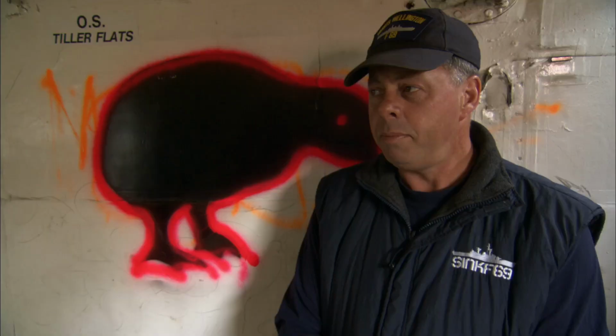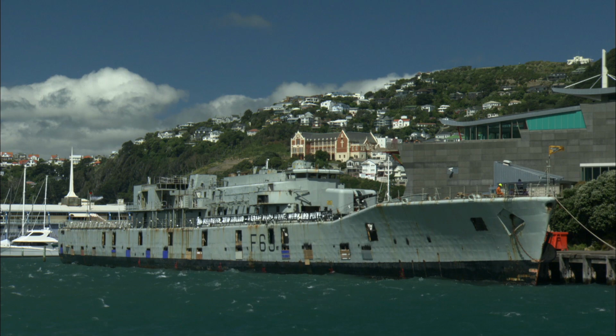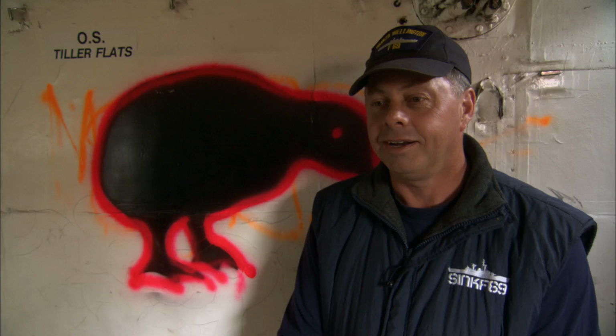Basically, our winds are hitting 30 to 40 knots. We've got a requirement under our insurance not to move in over 20 knots. We've got hulls pretty close to the water, as you know. This sort of angst of hanging on another day, you're going, ooh. But anyway, we'll get there. I knew it was going to become stressful at some stage, and I guess we're there.